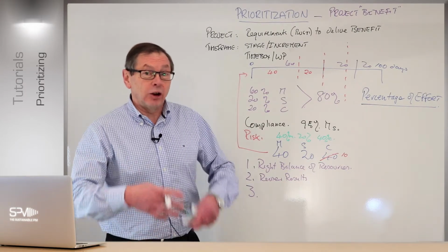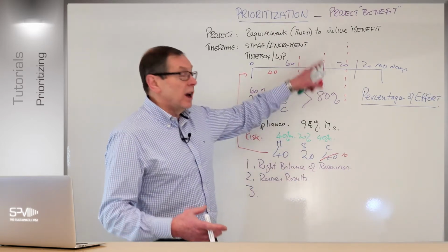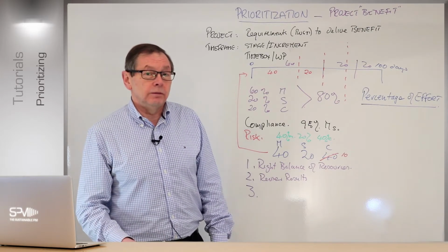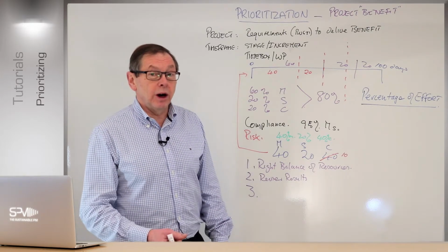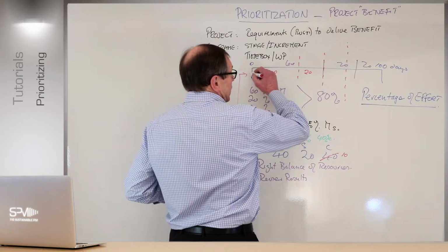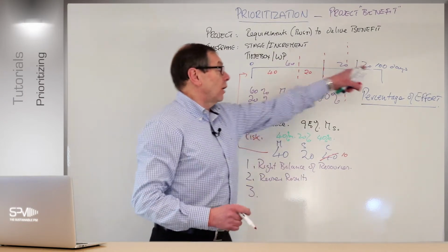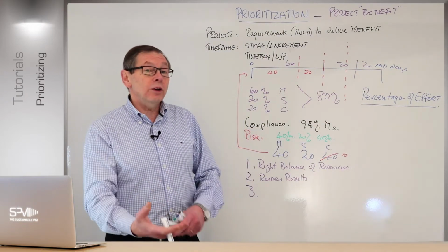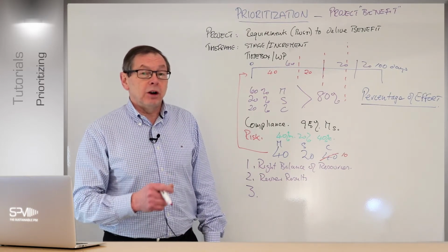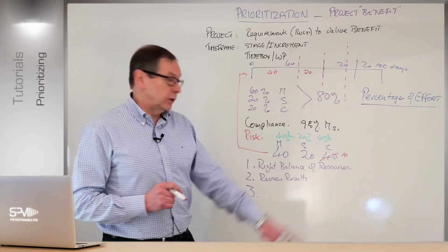This is realistic. Now, I'm not prioritizing to fit that rule, I'm prioritizing to do a sensible spend of time and costs on delivering the solution. This works really well because now I can deliver the solution sooner, because I'll still deliver the 40 must-haves over the 70 days rather than 100 days. So I'm delivering the project sooner and therefore at a lower cost as well, within the budget, but more realistically, a lot quicker than they thought of in the first place.